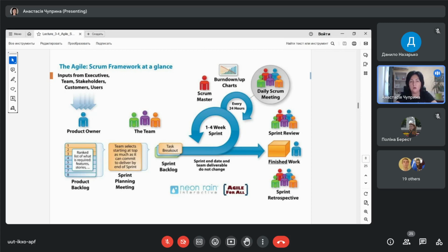So you have to write the function and split up each function into small technical tasks. For each task, you have to assign a responsible person from your team. So for each task, one person within your Scrum team will be responsible. If your function is divided into 3 tasks, for example, then 3 persons will be responsible for one function. Okay, so you break out your tasks.